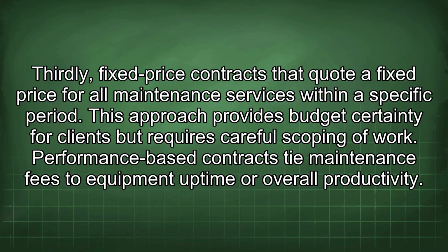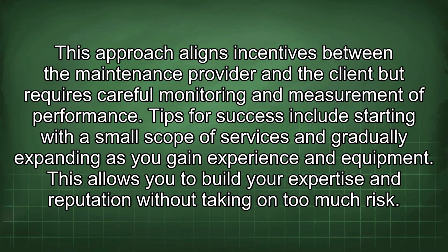Performance-based contracts tie maintenance fees to equipment uptime or overall productivity. This approach aligns incentives between the maintenance provider and the client, but requires careful monitoring and measurement of performance. Tips for success include starting with a small scope of services and gradually expanding as you gain experience and equipment. This allows you to build your expertise and reputation without taking on too much risk.